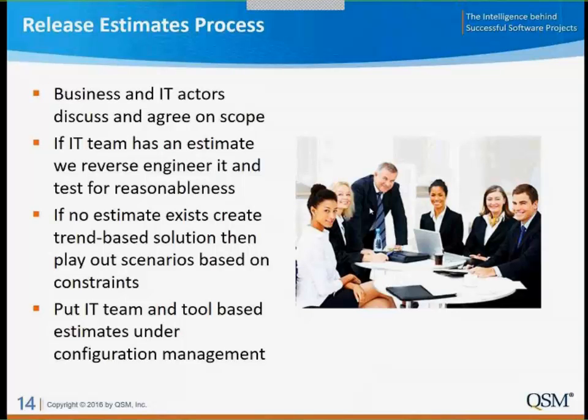If no estimate exists, then we're going to start with something that we'd call a trend-based solution. Let's start, for the scope that we've identified, in the center of your database. It's a safe solution. And then we can play out other scenarios, adding people, reducing people, changing productivity assumptions if those are warranted, so that we can get something that more accurately reflects the nature of the constraints that are being imposed on that particular release.